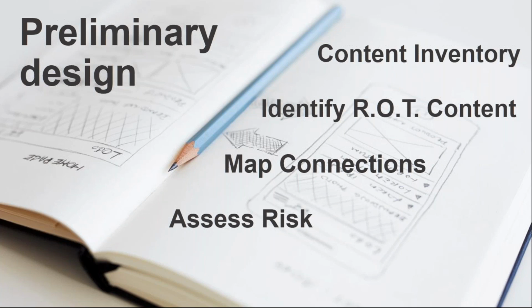The question often comes up, as far as how much content we should gather, how comprehensive we should be. And I tend to get pretty detailed as far as the inventory and immerse myself in the content, learn as much as I can about it. You don't necessarily have to go that deep. I would say just inventorying the content to the extent that you can include or exclude it from your scope, and then get more detailed with the in-scope content as appropriate.